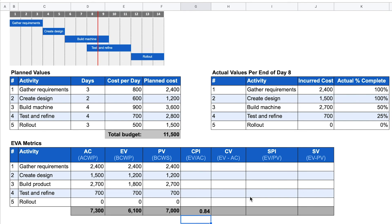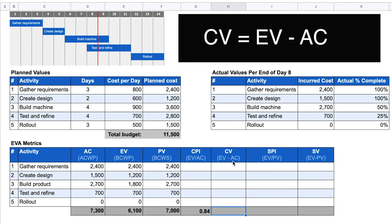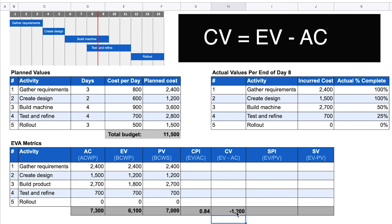We can now calculate the cost variance — how much more or less money are we actually spending? The cost variance is the difference between the earned value and the actual cost. In our case: earned value of $6,100 minus actual cost of $7,300 gives us a cost variance of minus $1,200. As a general rule, negative values are bad — we are over budget. This means at the end of the project we will be $1,200 above budget, assuming we continue work as performed and don't save money on remaining activities.